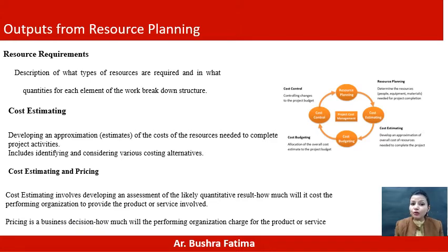Estimation is the most difficult of the steps involved in cost management, as accuracy is the key here. Also, project managers have to consider factors such as fixed and variable cost, overheads, inflation, and the time value of money. The greater the deviation between estimation and actual cost, the less likely it is for a project to succeed. However, there are many estimation models to choose from.